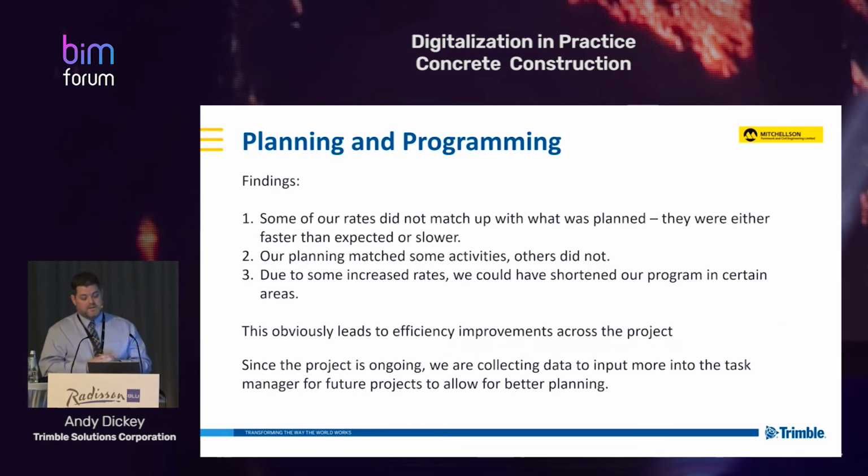So what were the findings on planning and programming? Some of the production planning that they did in Tekla didn't match their traditional production planning, because the traditional production planning is so rough, so it's not detailed. And so they're thinking, wow, now I can have a better understanding when I have a more complicated project or in some different cases, is my estimate really accurate?